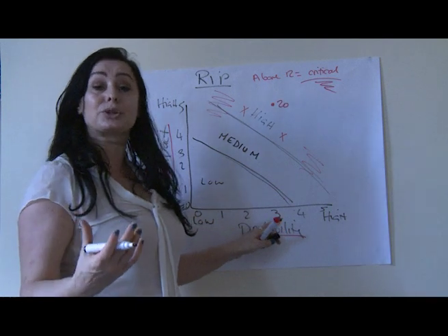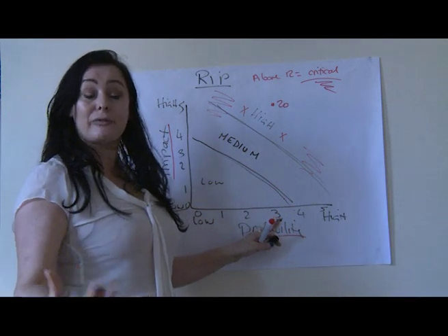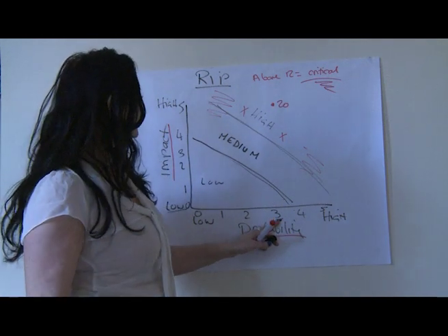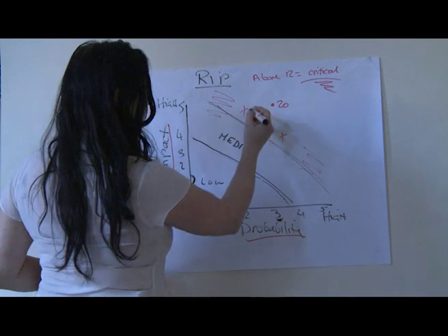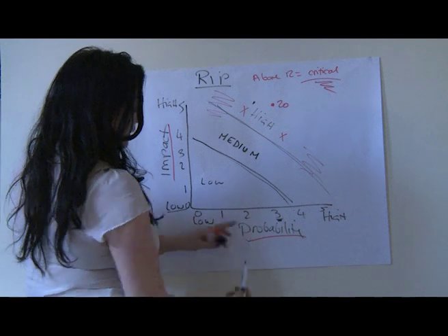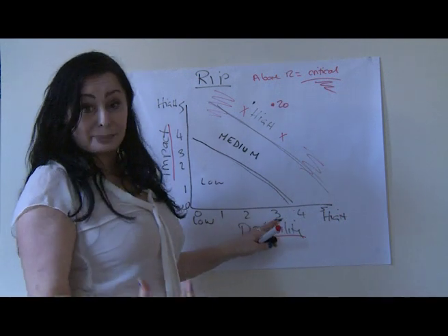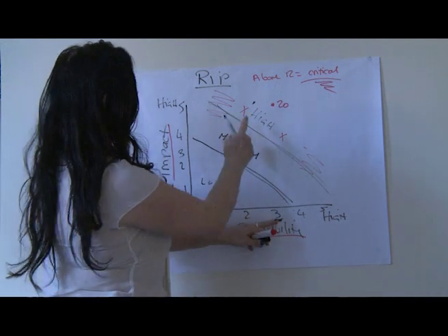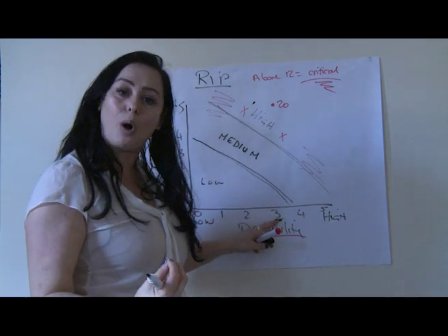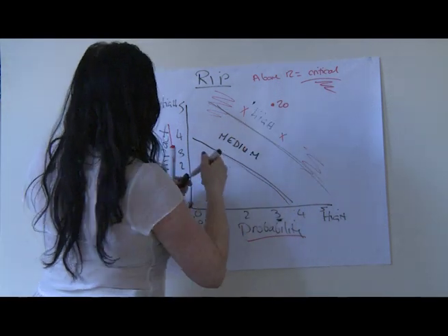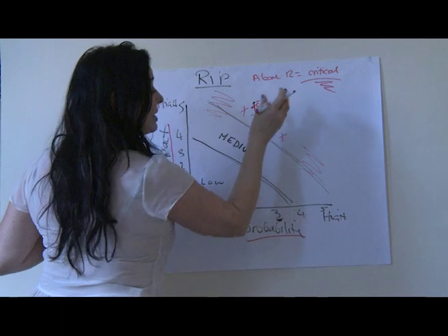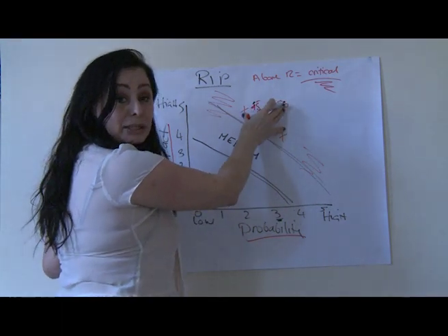Now, if that's your only trainer that you have and you're carrying out 4 to 5 training days every single month and you have nobody else to train, then that's quite a high impact. So 3, the probability of them being sick at some point during their time working for you, and 5, the impact it's likely to have because training would stop. 3 times 5 is 15. Again, that's above 12. That's another critical thing that you need to think about.